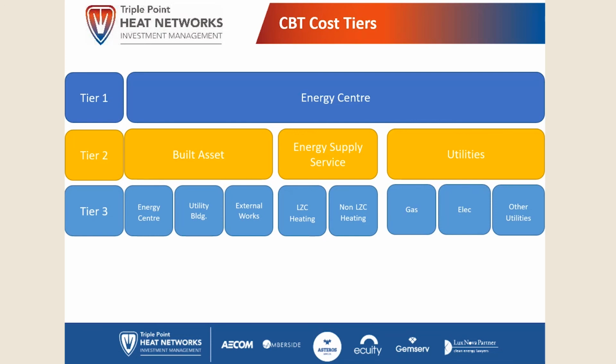So we have three levels of description for each of the cost items that you enter. The first tier is very broad and relates to the 6 categories I mentioned above. So you would either say that the cost item is something to do with the energy center or the heat distribution or internals, or it's a project on cost. Very broad and simplistic.